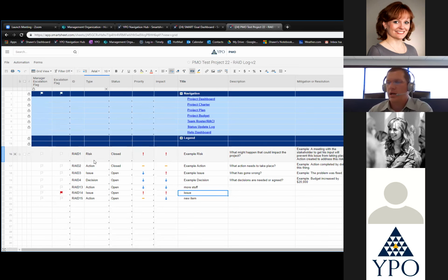If you actually just record your risks, that puts it in your mind of something that might go wrong. You can come up with a mitigation strategy for making sure that it either doesn't take place, or that if it does, you minimize the impact of that risk. So risk planning is useful for looking ahead to make sure stuff doesn't derail your project.